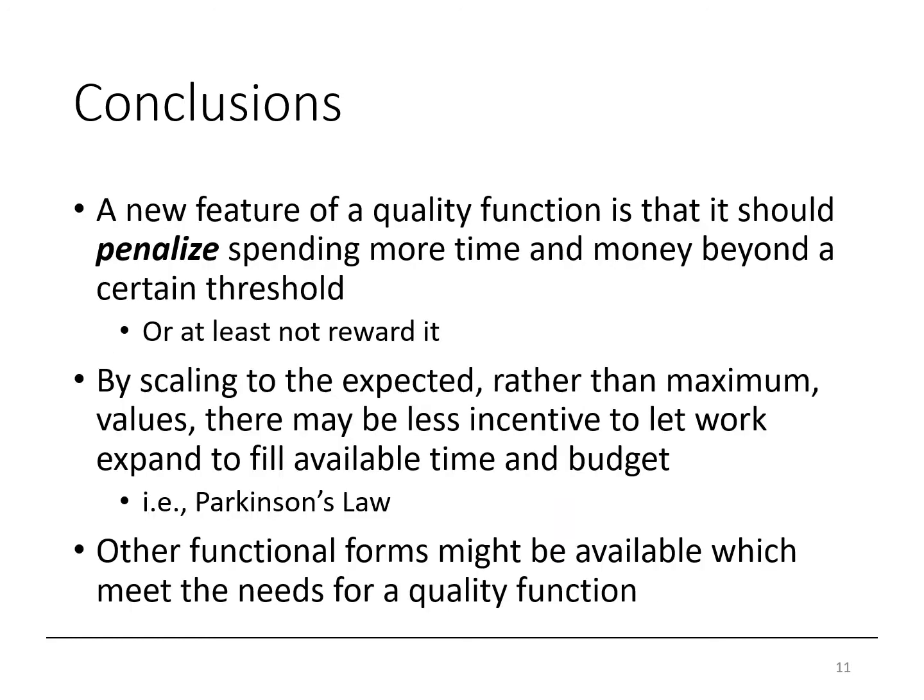In terms of conclusions, we found that perhaps a new criterion for what makes a good quality function is that it should penalize spending more time and money beyond a certain threshold, or at least the function shouldn't reward spending more time and money. Also, by scaling our function to the expected rather than maximum values of time and cost, there may be less incentive to let work expand to fill the available time and budget — a phenomenon in project management known as Parkinson's law. Finally, these are preliminary research results, and much more research needs to be done in the area of quality measurement, especially related to project activities.